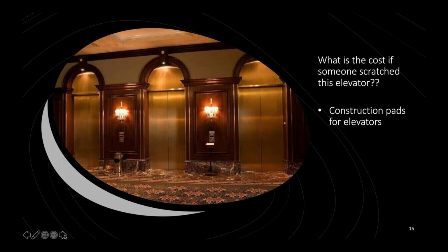You call an elevator company, you tell them what you've got, you get some elevator pads put in there, or you simply construct your own protection around those elevator cars and the corners going in and out of those. These cars are very expensive, and even to remodel one on the inside, if you get it scratched, will cost you more money than you would want to pay.